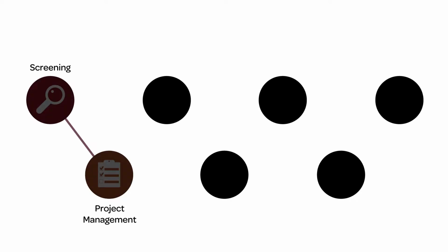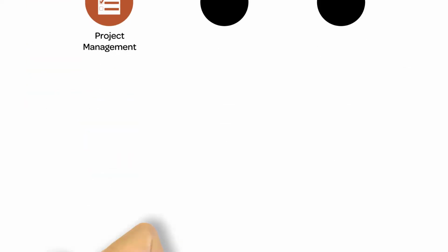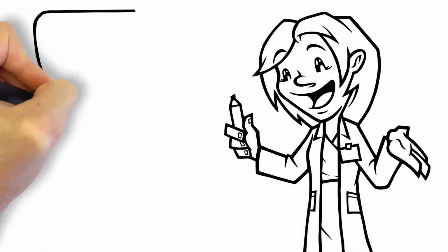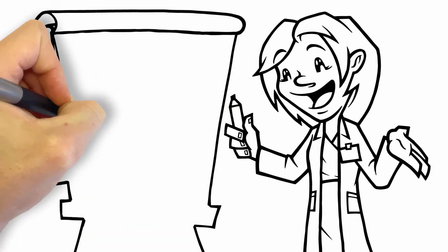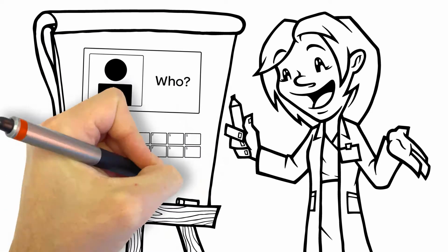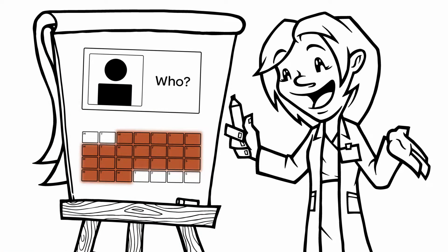Phase 2. Project management. To develop, implement and evaluate a care pathway, a project structure has to be set up. The pathway must be clearly defined, both regarding the patient group, this means clearly specifying inclusion and exclusion criteria, and the time period, i.e. the start and end point.